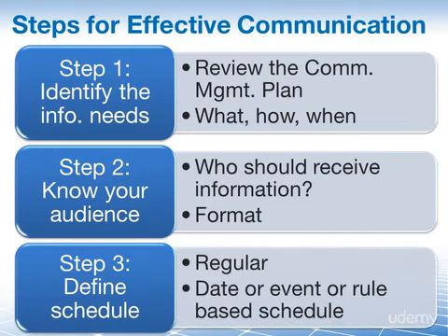Usually, this means that you will schedule regular communications. For example, your stakeholders should expect to receive a status report every Friday. But sending out communications does not necessarily have to be triggered by a date. It can also be triggered because a certain event has happened. For instance, your communications schedule can include rules such as if we are more than 10% ahead of or behind our schedule, we will send out a notice. Remember also that you don't communicate just for communication's sake. You communicate to keep your stakeholders apprised and ward off any problems. Be prepared to change the schedule if you are not meeting their needs.